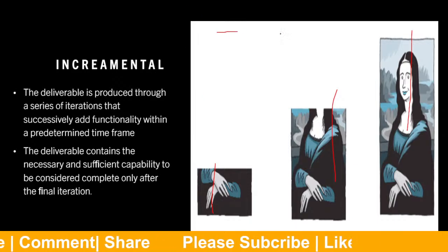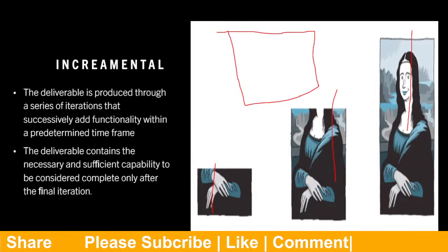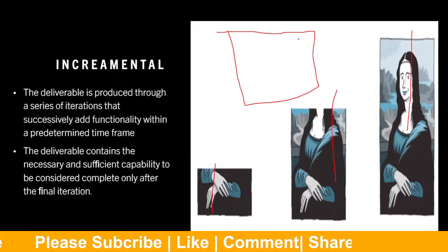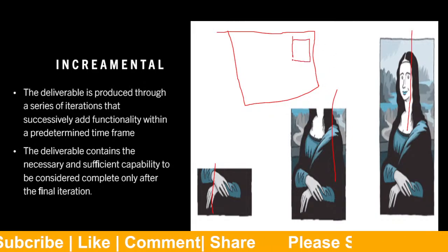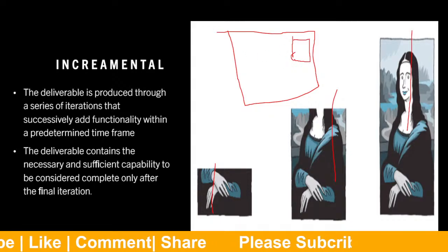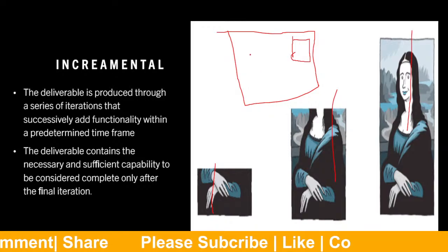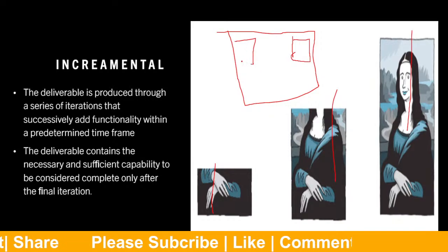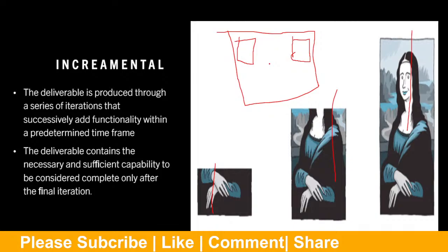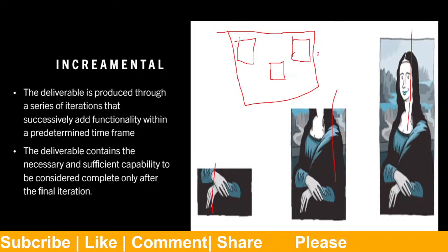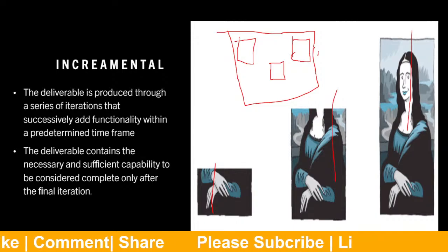It's like you want to build a website. Instead of waiting to complete the website and go, you can build a web page and give it to the customer. This is the front page. They will check and things like that. If they are okay with it or not, they will come with feedback. Then you can design another page, maybe contact page, maybe gallery. You'll be adding functionality to what you have done. So it's increasing.